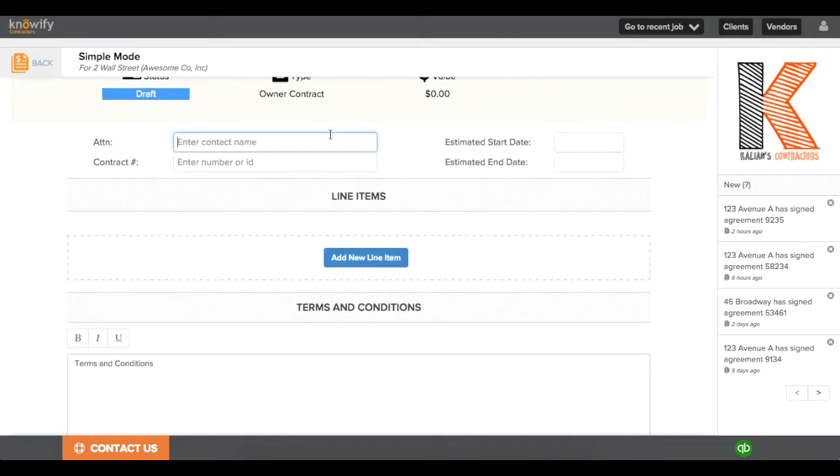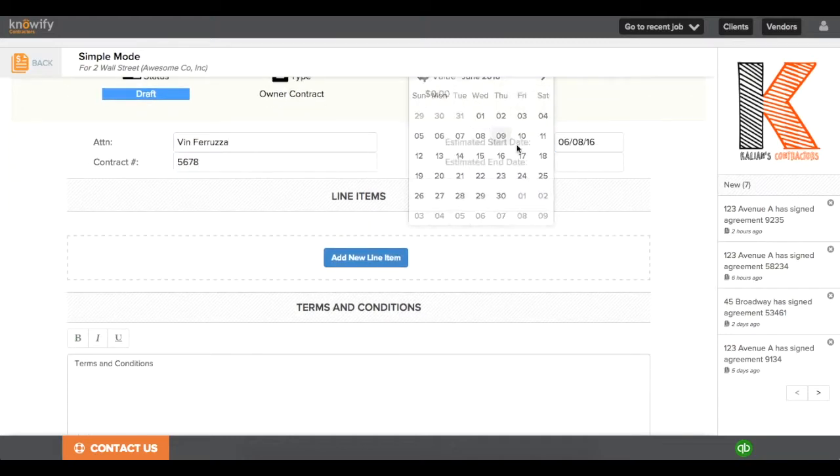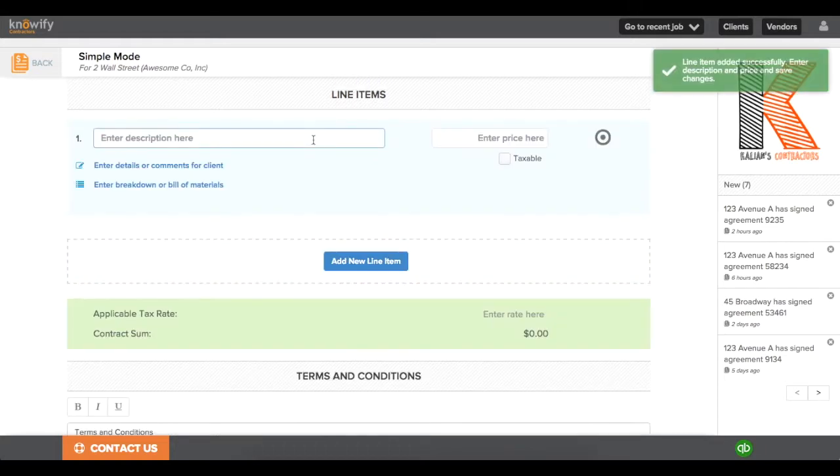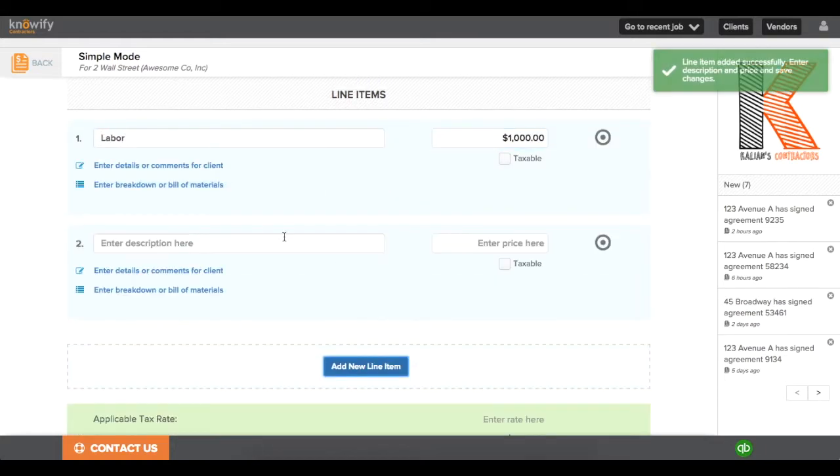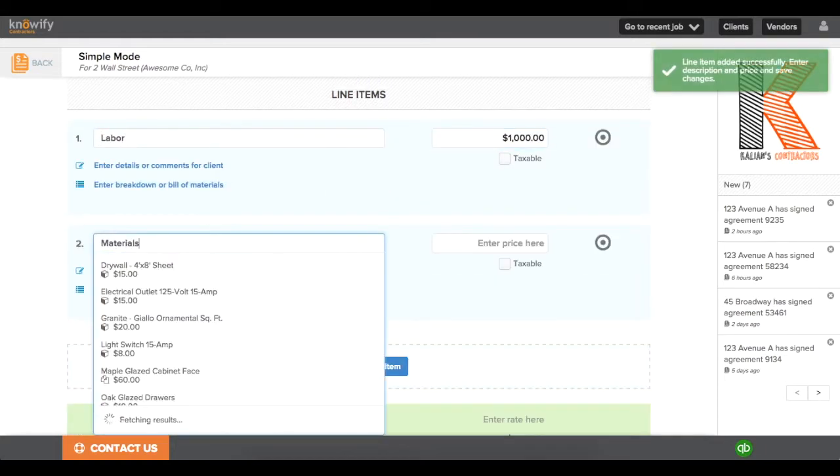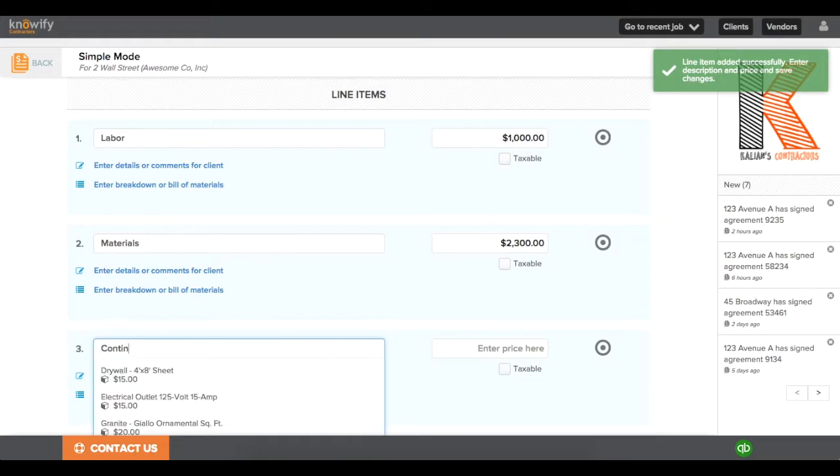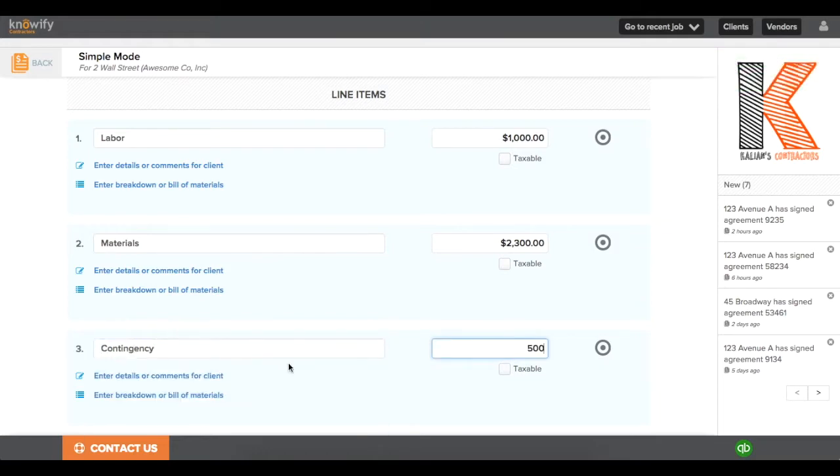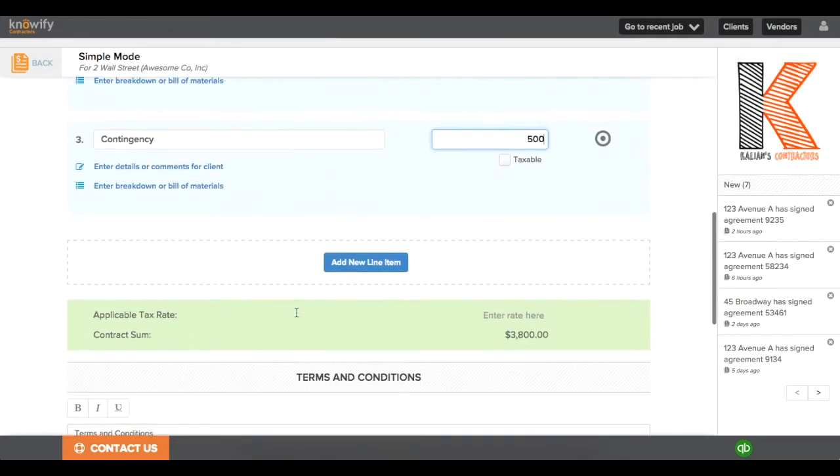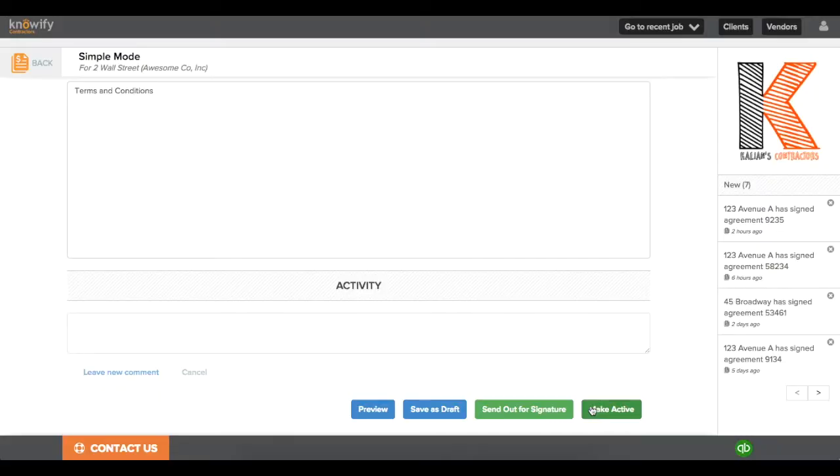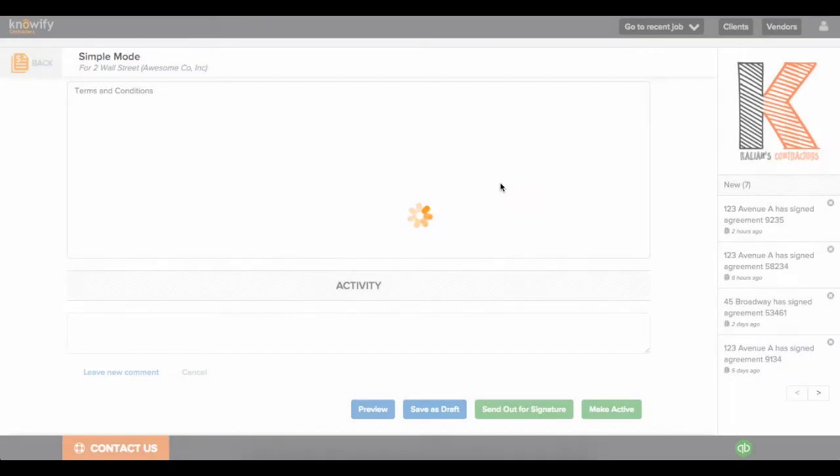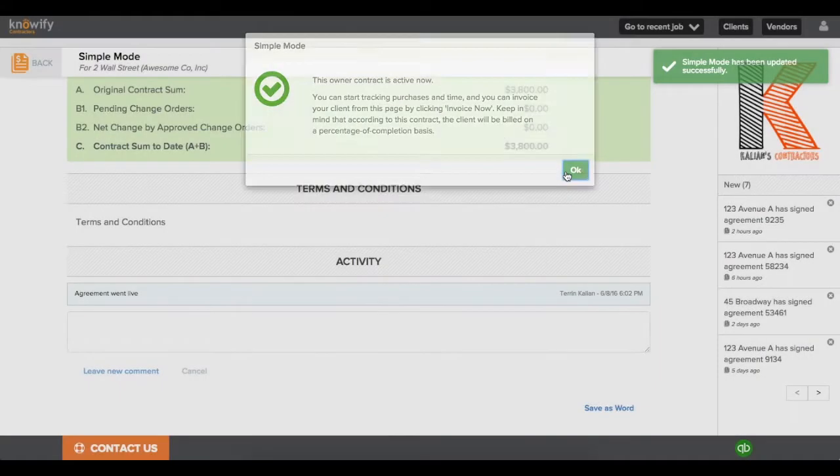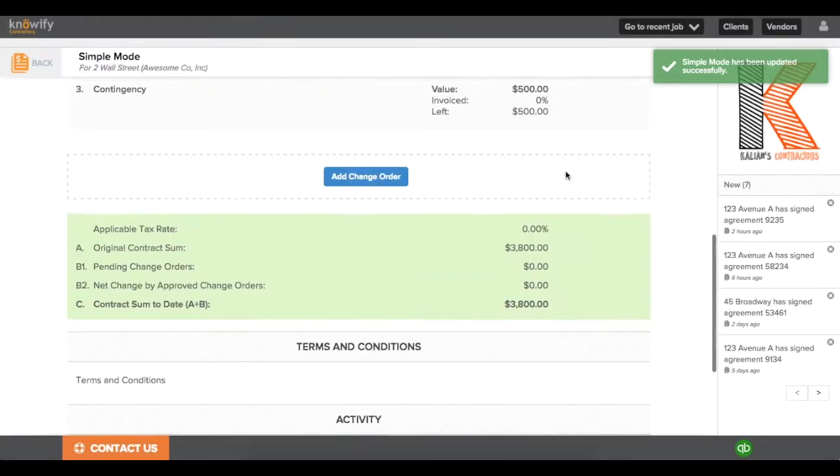We'll put together a contract really quick, just for the sake of example. We'll put in some basic contact information and then a list of different line items. I'll just call mine Labor and Materials and add one for contingency. Then we'll make this contract active, and it'll automatically activate the project plan and track as well.